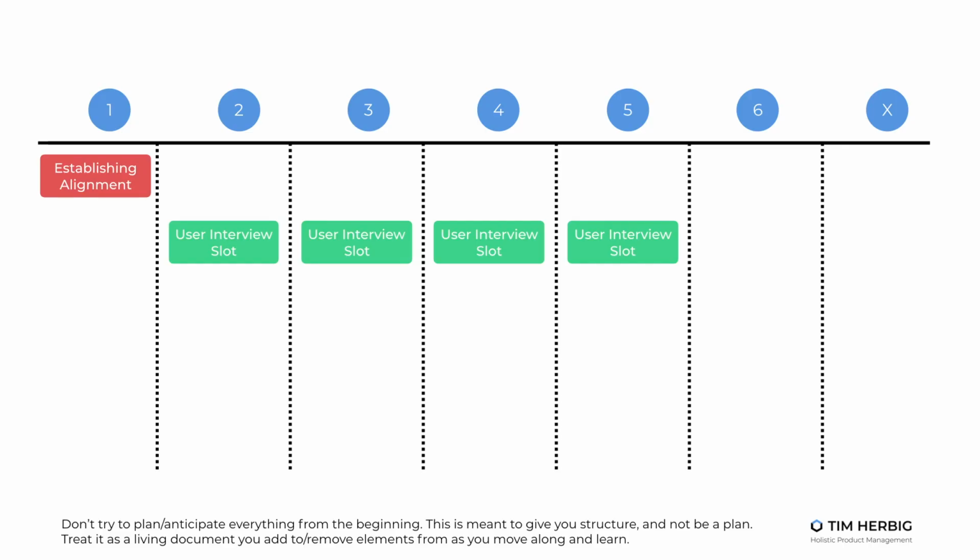While we just talked about alignment and alignment meetings as one example of that, there are a couple of other examples you want to keep in mind. Even in the most mature companies, you have to deal with a lead time of 1 to 2 weeks in order to recruit users for qualitative interviews on site. Meaning you want to get those research sessions as quickly scheduled as possible to avoid having an unnecessary lead time in between sessions to test out iterations.